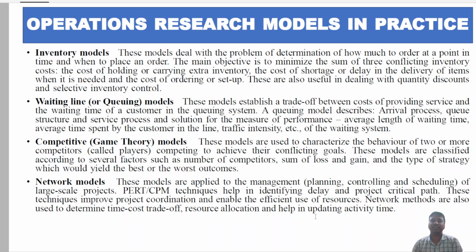Next one is the network model. These models are applied to the management, that is planning, controlling and scheduling, of large-scale projects. PERT or CPM techniques help in identifying delay and the project critical path. These techniques improve project coordination and enable the efficient use of resources. Network methods are also used to determine time-cost trade-off and resource allocation, and help in updating activity time.